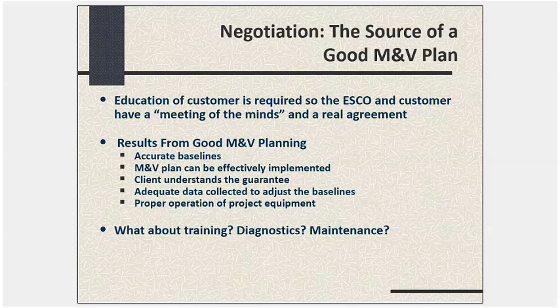And then it's also important for the operation and maintenance personnel in the agency staff to understand and buy into the M&B process, to the extent they're going to be witnessing measurements and participating in the process. And if it requires data to be collected from them that is necessary in order to help adjust the baseline, that's something they may be participating in. And also to help them be trained so that there's proper operation of the project equipment, so it doesn't do something that would potentially reduce savings unnecessarily.